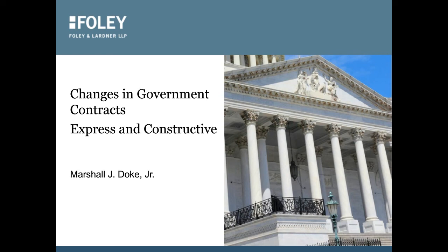In government contracts, with a constructive change order, the law will provide the relief which would be appropriate if a change order should have been issued. An early case said that when a change order should have been issued, the boards and courts must treat as done what should have been done. I'll now cover some examples of constructive changes. Not direct changes, but constructive changes.